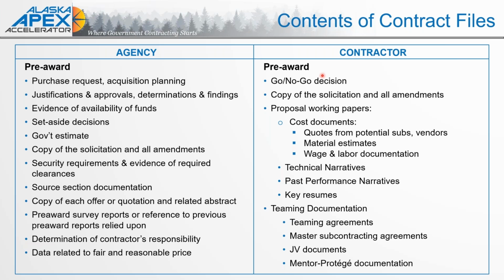Part of the value of having and maintaining these records is that down the road, there may be another cycle of this contract activity, or a similar contract is issued. Instead of having to rebuild everything from scratch, you have old contract files and old solicitation and proposal files that you can pull and say, okay, what did we decide on that? How did we go about it? What was our starting activity and documentation? That way you can jumpstart your next activity of a similar nature.